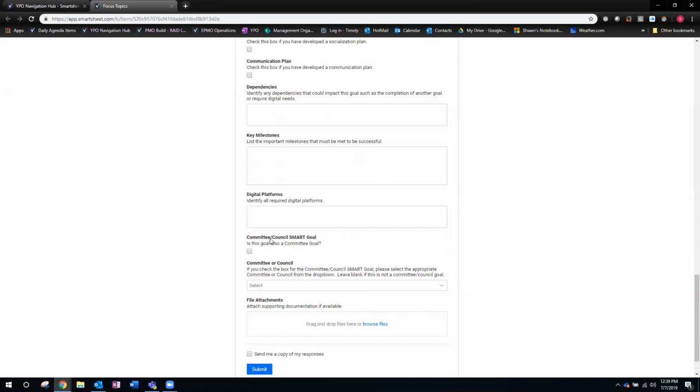Are there any digital platforms that this depends on? We might need to list them here if perhaps they are a risk if they're not going to be available, or perhaps this project can't start until they are available, or an upgrade or something. So list your digital platforms here.